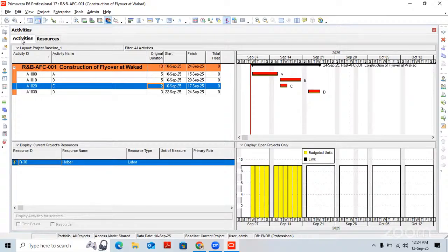If we feel we are achieving the productivity or whatever the plan targets, then we can shift the resources we don't require. This happens many times when you don't have a work front. In this case, you have to demobilize your resources. You cannot keep those resources on your side, because that will be your overheads.